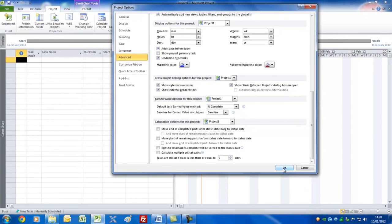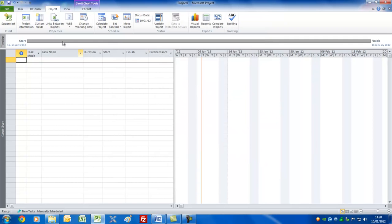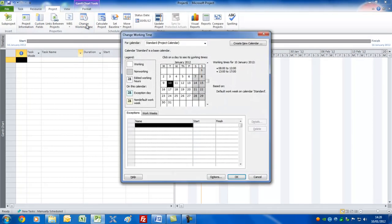Let's press the OK button. The next step is to actually set up your project calendar. To do this, we stay on the Project menu and go to Change Working Time. For small, simple projects I don't see any reason why you'd need to change this. Project by default starts at 8 o'clock in the morning, goes through to 12 o'clock — 4 hours work — takes an hour off for lunch, and then does 4 hours in the afternoon, bringing you to 17:00 or 5 o'clock. It doesn't work Saturdays and Sundays — that's the default setting.